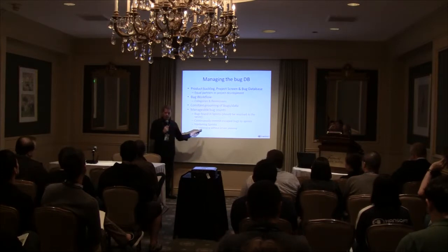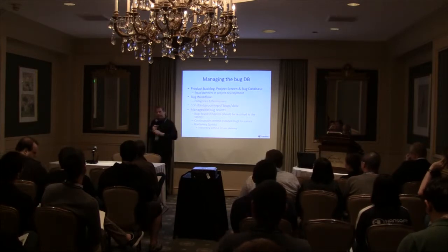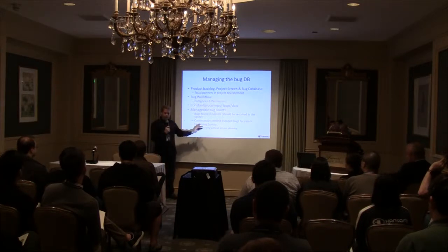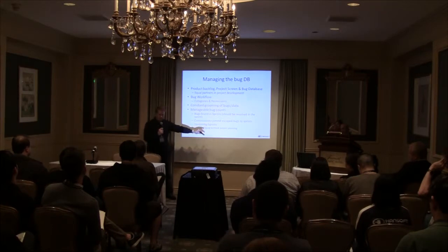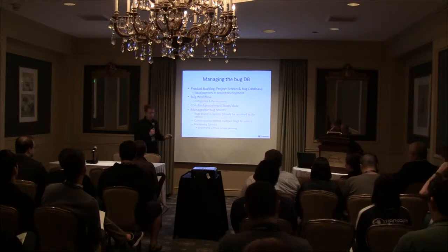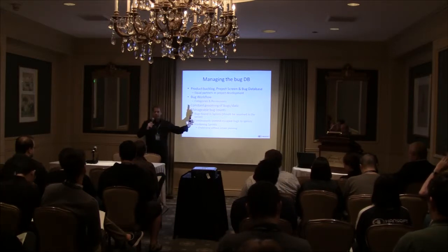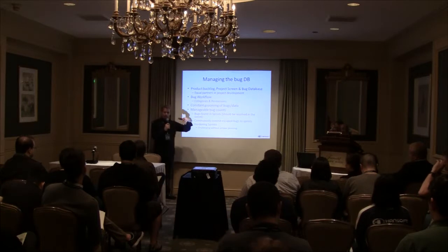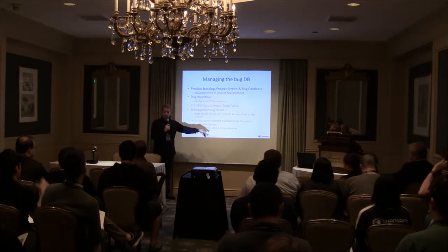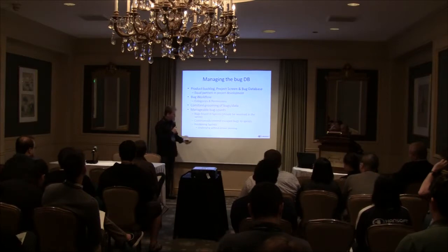If you can plan a hardening sprint correctly, what you're doing is taking everything that you've built in that last release and finishing off any related bug that you couldn't get to for some reason, whether it was capacity, time, whatever it might be. But if you are going to do these hardening sprints, make sure you plan them out in detail, because they will end up being just an empty bucket of time. And of course, having come from the design side as well, I will throw in design and say, hey, let's get this in while we've got time. So make sure you're accounting for that.